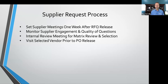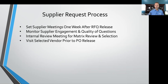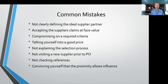The internal review meeting involves getting your selection team together to go over the matrix you've created. Then visit the selected vendor prior to PO release — I strongly encourage this. Do not issue purchase orders without confirming the company has the facility and means to execute your project. That company down in Mexico — we drove by it and it had dirt floors. The building where they were going to build the equipment literally had dirt floors. We knew early on we would struggle to compete on price, but we knew we had them on process and technology understanding.